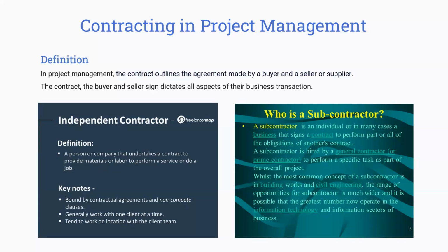So the point is, a subcontractor is hired by the general contractor, or the prime contractor. Here you will not have any direct connection with the subcontractor. All your communications will be only with the prime contractor.